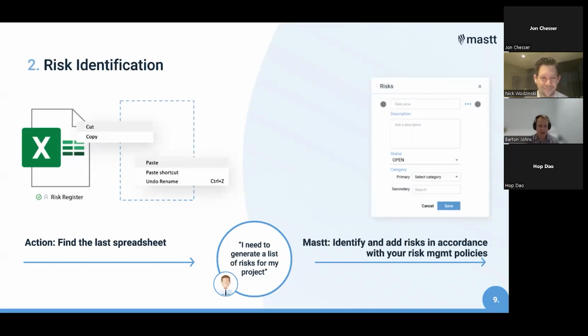But yeah, traditionally we'll hold an early risk workshop soon after our appointment. Once we've got a good grasp of the project scope and we've defined that scope and signed it off with the client, and perhaps we've visited the site or sites for the work, then we will review the risks in a risk workshop. That risk workshop will be attended by just the key project stakeholders.